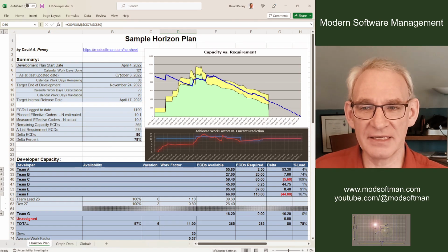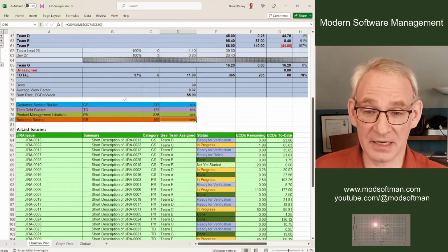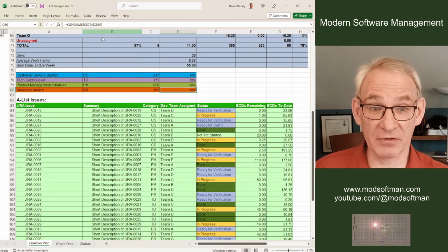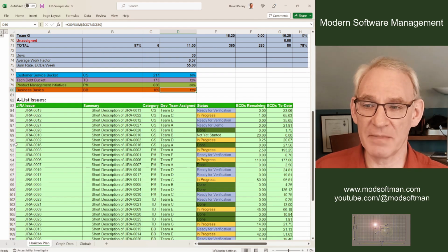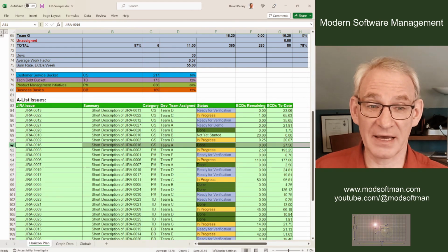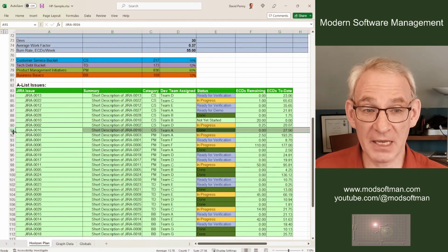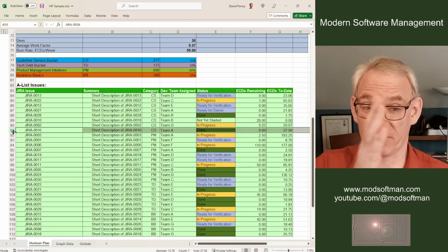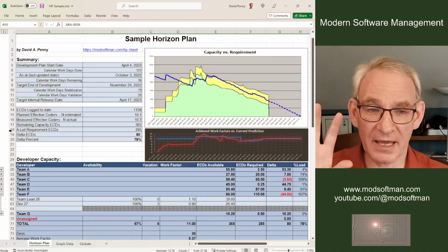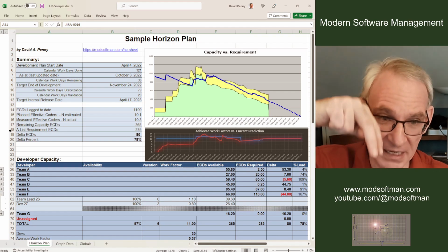It's important to understand these dates are not commitments, they're target dates. If you do need to make a customer commitment, then you pad out the date further than your planned date, ideally, and you commit to the smallest possible thing you can commit to and go forward with that. You really don't like doing that, though, because as soon as you do that, it puts a pin in the plan. You can't move the date any further out than that, and this feature absolutely must go in.